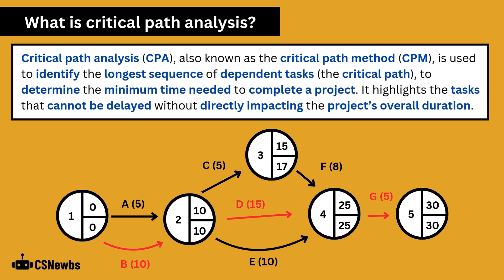Critical path analysis, also known as the critical path method, is used to identify the longest sequence of dependent tasks to determine the minimum time needed to complete a project.